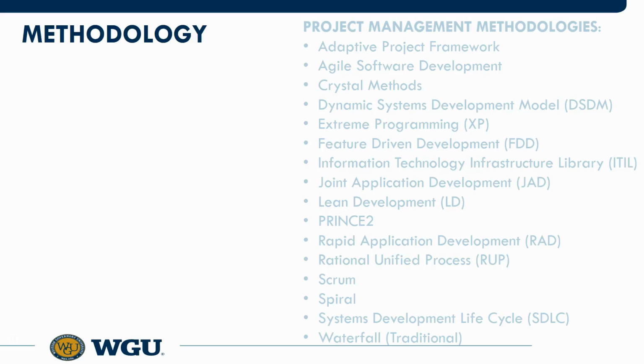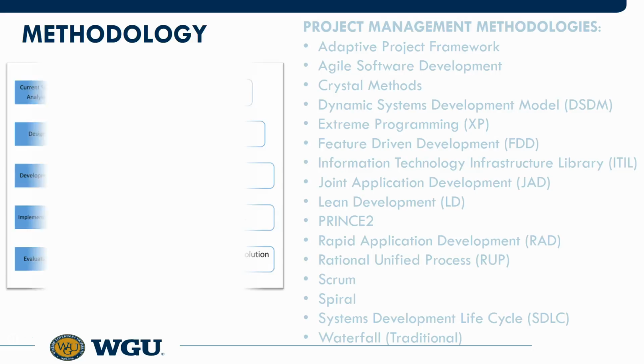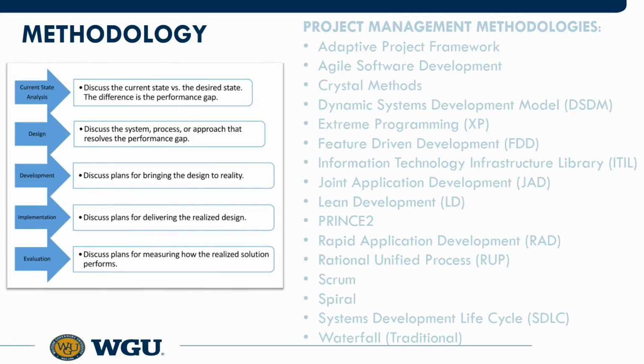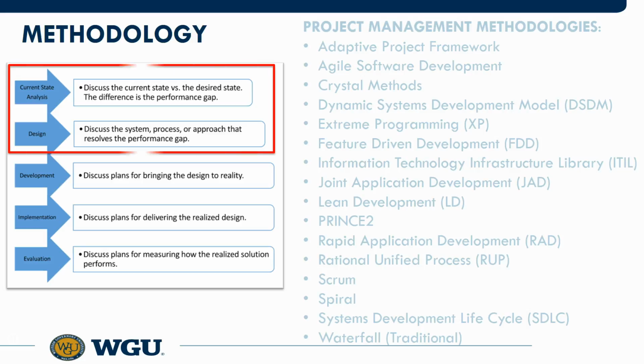If you aren't aware of the methodology used in your project, or just want to choose one that you feel fits best, try Googling project development methodologies and investigate some of the possibilities. The most generic of the methodologies that I am aware of is ADDIE: Analysis, Design, Development, Implementation, and Evaluation. Using its terminology, most project proposals are concerned with the analysis and design stages, but will describe plans for the remaining stages. Those later stages will get more attention in the capstone.